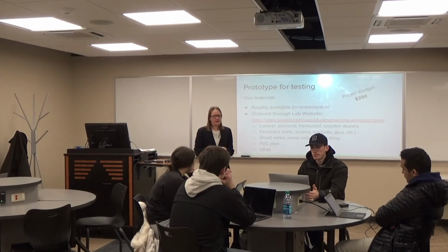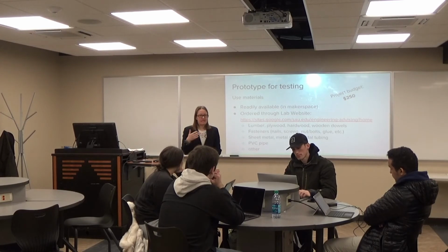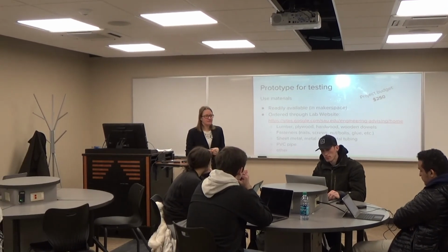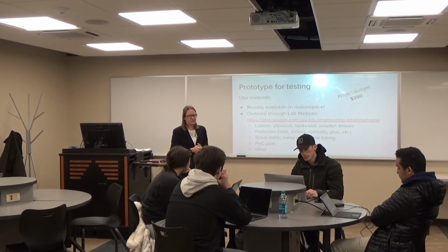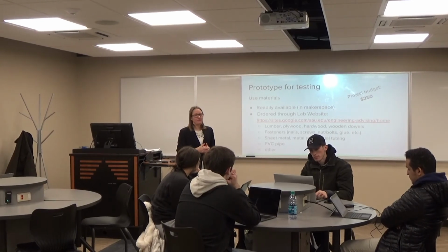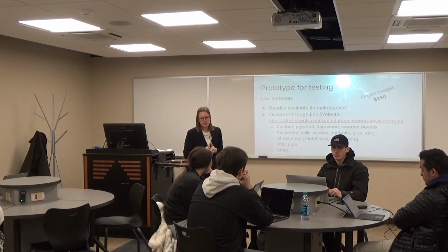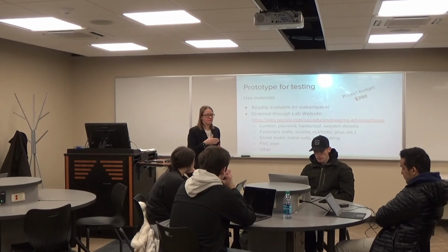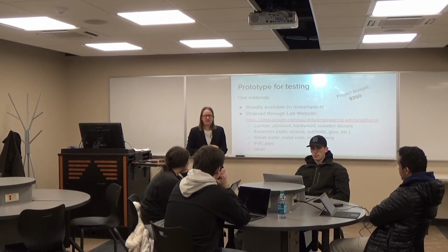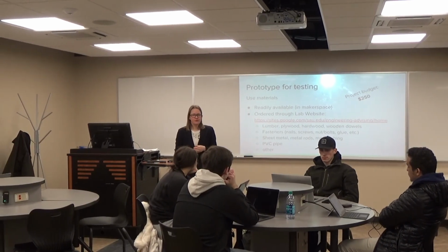Everybody should have a budget in there where you detail what you're buying, how much it costs, and as things go down, you'll see how much budget you have left. And that will help you make your bill of materials too at the end of the day. You'll see which one of those things that you bought did you actually use for your final prototype.